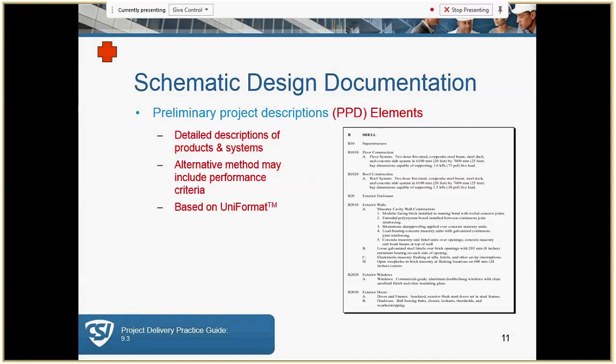Schematic design is going to be the best approach here. We're going to review some elements of preliminary project descriptions: they are detailed descriptions of products and systems, they may include performance criteria, and the key component here is that this is going to be based on UNIFORMAT. Your resource guide does go into more information on UNIFORMAT, which you can read in that reference book.